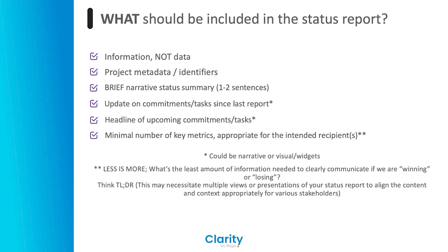And then lastly, we want to make sure that we're including some key metrics. Most commonly for traditional waterfall projects are going to have the good old iron triangle of scope, schedule, budget, often presented in kind of that red, yellow, green status, or red, amber, green if you've heard of them referred to as RAG metrics. But maybe it's informative to include a metric on your staffing. Does our current EAC and resource utilization reflect any changes to the original estimated resource effort? Staffing issues is one of the most common reasons for project delays, so your stakeholders will most likely want to see something about this. Metrics might also include data about risks, issues, or change requests.